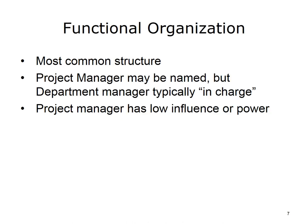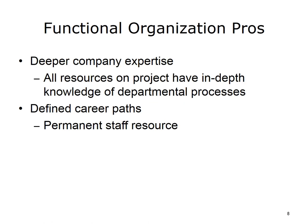The most common organization type is a functional organizational structure. In a functional organizational structure, the department manager is responsible for the project outcome, as well as for managing the various teams on that project. A project manager may be named, but that person typically has low influence or power. One positive aspect of a functional environment is that there is deeper company expertise related to the functions. People have in-depth knowledge of processes, and there are well-defined career paths for individuals. In a functional environment, employees are hired as permanent departmental resources with very specific expertise, not as temporary project resources.